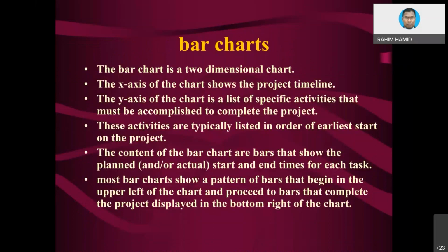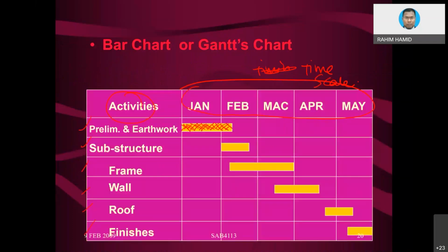So a bar chart is basically a two-dimensional axis: the timeline, and then Y reflects the specific names of the activities. Normally we show the duration of the activity, but we can put in many more things. Later on, we are going to learn how to put in columns for duration, cost and resources as well. Then you can see the whole picture.